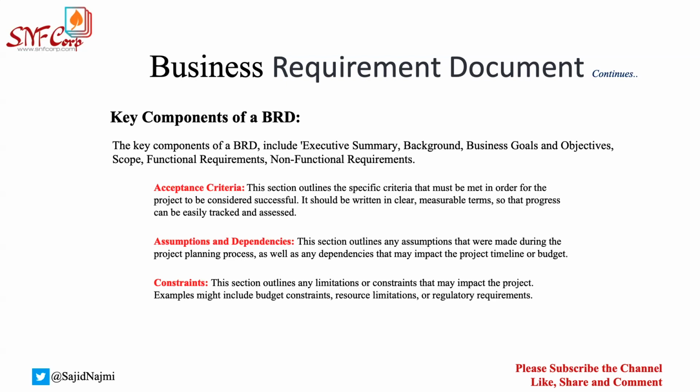Business has to provide this set of data by this date in order for us to complete the testing and deliver you on time. So this is the dependencies. You will also write, if the data is not being provided, this might impact the project delivery timeline. So those dependencies you will have to write very clearly.